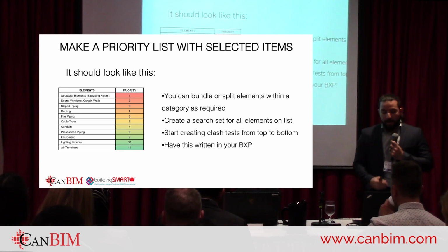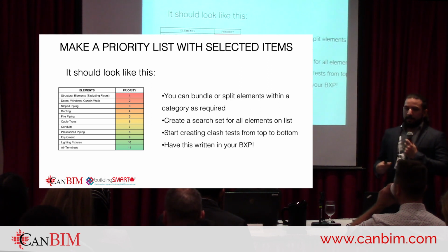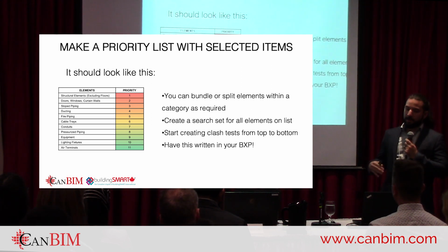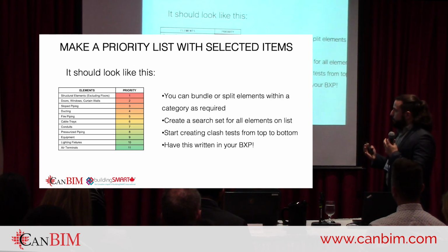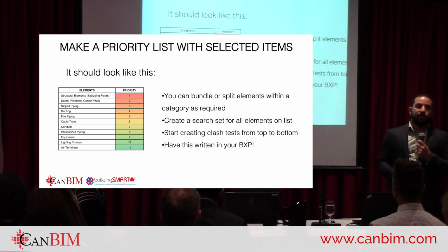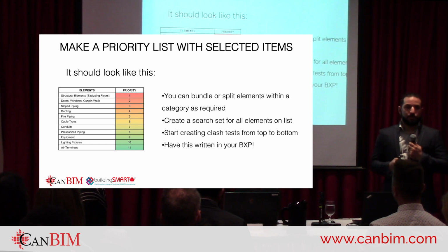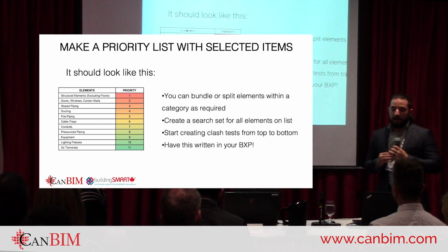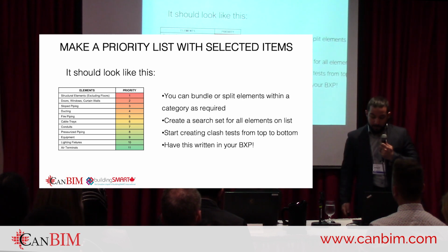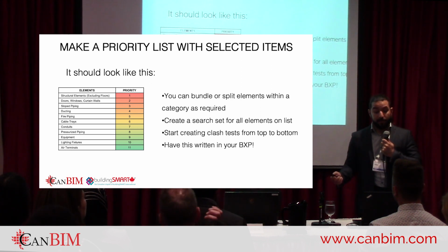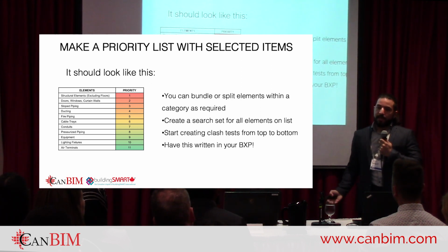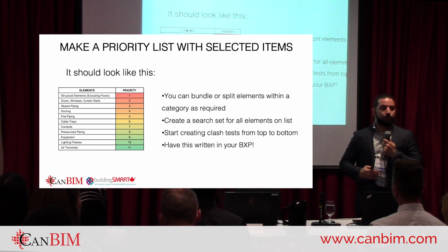And if you're not an integrated practice, it's a good idea to put this in your BIM execution plan and check with your sub-consultants so everybody's on board and you're not going to get objections like 3 months down the road. And one thing you will realize here is a lot of items are M&E related, and that is normal because that usually is what requires the most coordination.